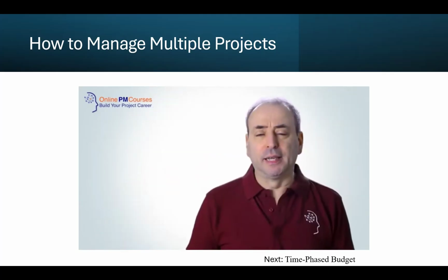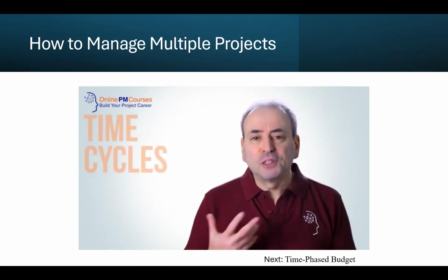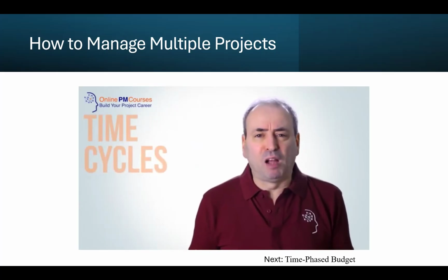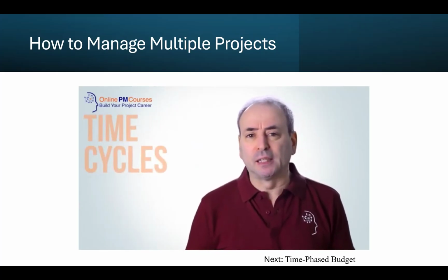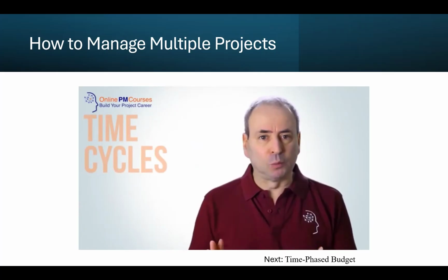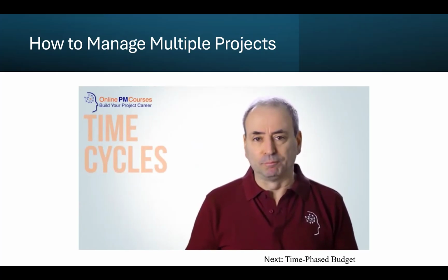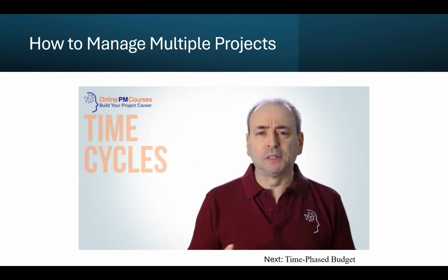The second key idea is to understand the time cycle of each of the projects you're trying to manage. For some projects, you'll find that things hardly change from one week to the next, whereas other projects, well, something seems to happen almost every day. And there are other projects where, if you turn your back for 10 minutes, everything's changed. Recognizing that time cycle means you know how frequently you need to check in with each project.